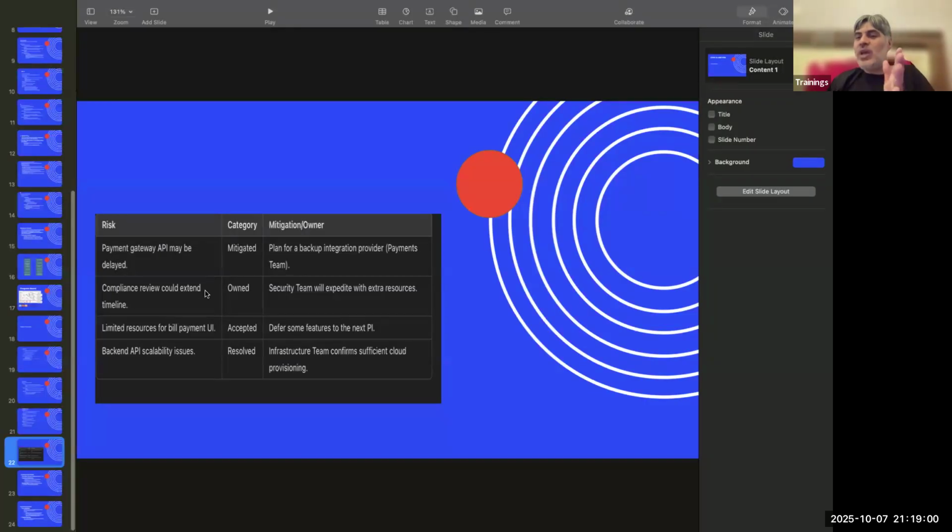Basically, the logic should be clear on how you do risk management. Identification of risks is important. Where do you identify risk? In the grooming call, in the sprint planning, in the daily stand-up. These are your 3 events where you identify risks.